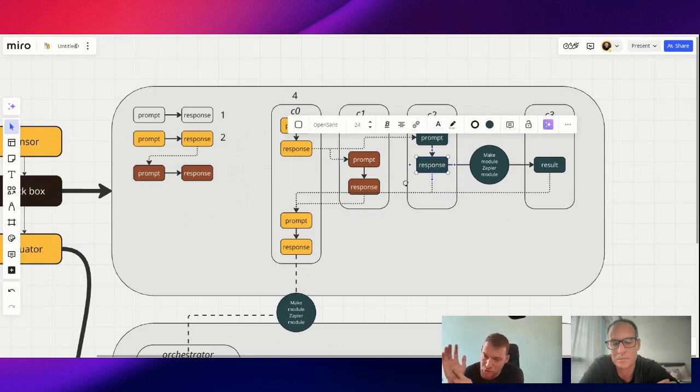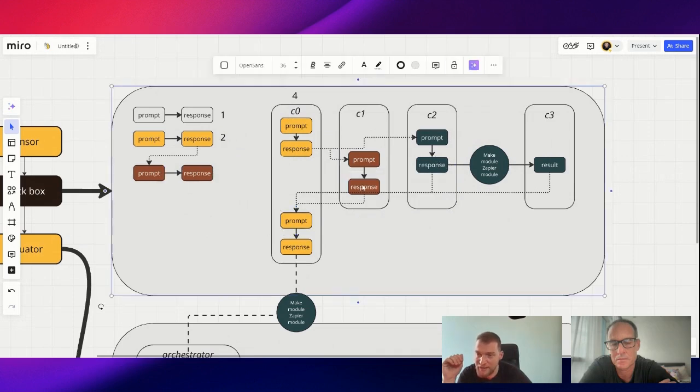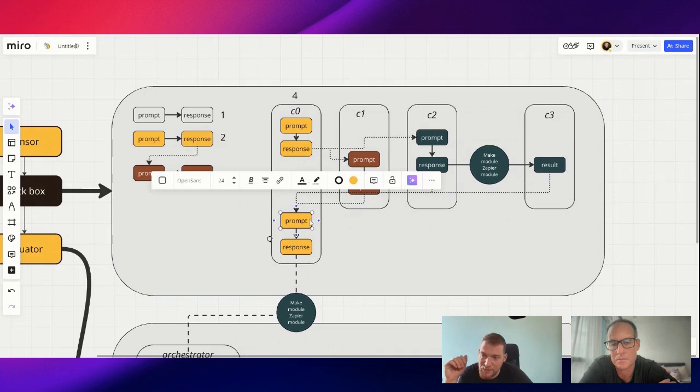And the current estimate for that is 2 weeks and $5,000. But Susan just said that the contractor is being late, so the new estimate is $7,000 in 4 weeks. So now I'm sending that information back to this one, and now this is verified. This is the change, and this is what needs to be changed. Then this one summarizes and says, the contractor is late, so we need to change the deadline from 2 weeks to 4 weeks, and we need to change the cost from $5,000 to $7,000.